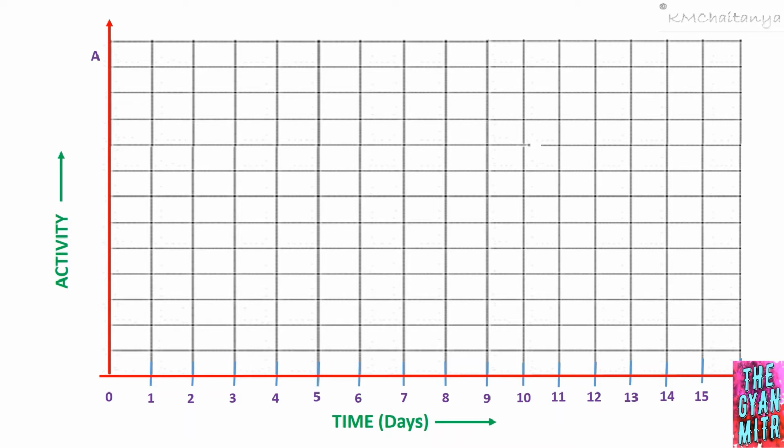Now the duration of the activity A is 1 day, and also from the relation we have seen that activity A is the first activity that has to be performed. Therefore all the activities which are the first or which are going to start at the beginning, for them we always have to start from time t equal to 0. That is because the start time for the project is always taken as time t equal to 0.